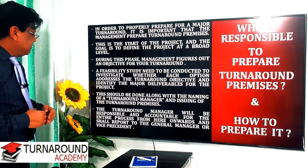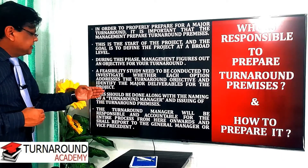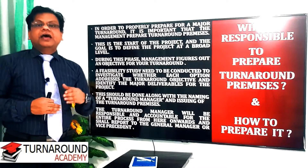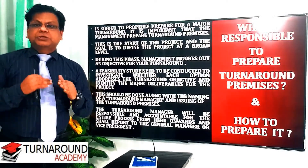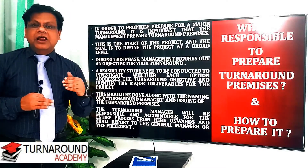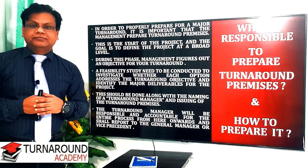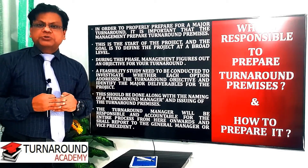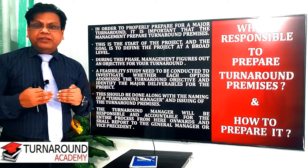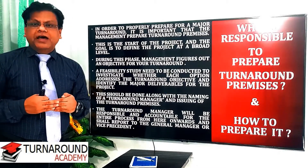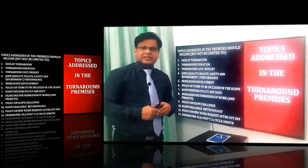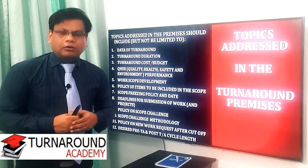The turnaround manager will be responsible and accountable for the entire process from that point onwards and shall report to the General Manager or Vice President. From that point, the turnaround manager is responsible and accountable for all aspects of the turnaround. Who is responsible to prepare the turnaround premises? Senior management — the General Manager or Vice President of the division.